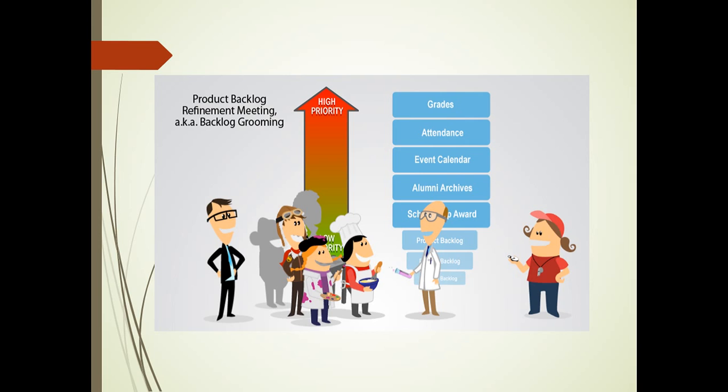There are three entities involved in this meeting: the product owner, the development team, and the scrum master. This meeting is time boxed and it should not exceed more than 2 hours in case the sprint duration is 2 weeks. In my product development, I conduct this meeting weekly, and that's usually on Thursday.